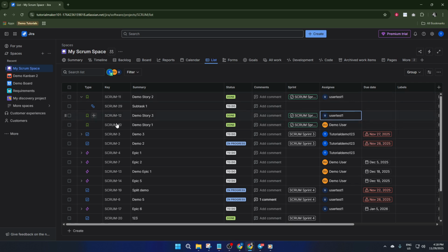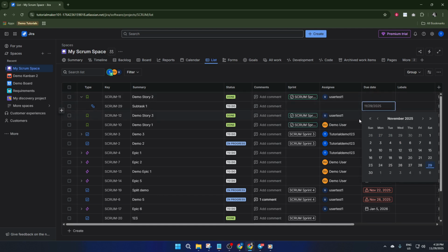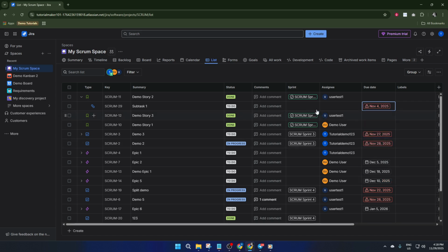Speaking of progress, let's talk about tracking. It's essential to monitor and update the status for each active subtask throughout the sprint. This gives everyone a realistic view of how the team's progressing, and it flags up bottlenecks or issues promptly, so you can address them in a timely manner.